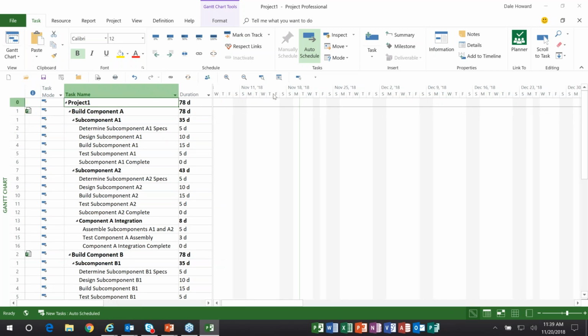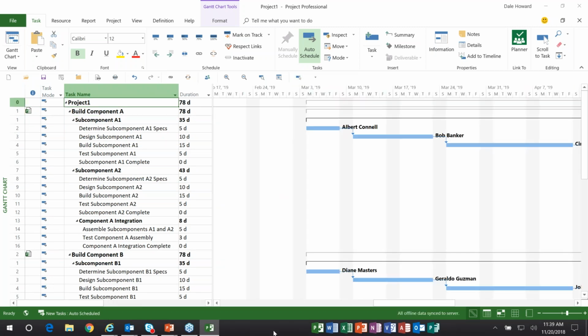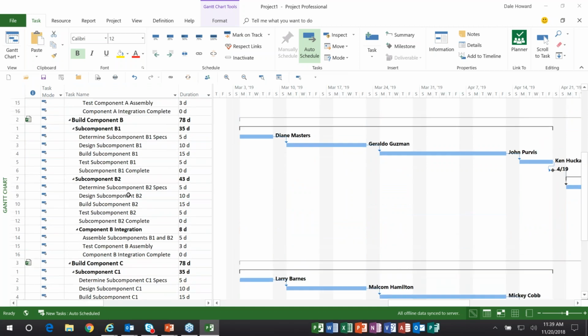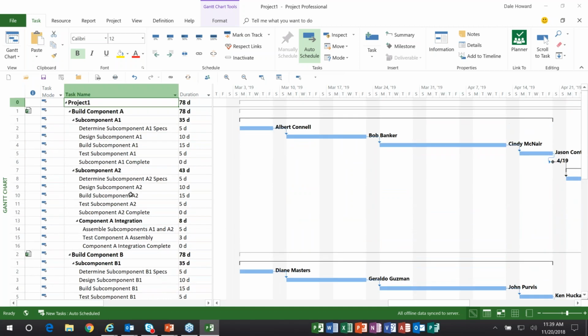These 3 sub-projects, I can now analyze the whole program if it was underway. If we're in the planning stage, I could set cross-project dependencies as I need to do. I could analyze and resolve resource over allocations.